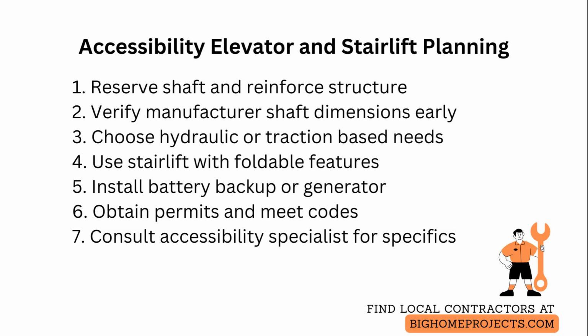Ensure all designs meet local accessibility codes and elevator safety standards and obtain permits early to avoid construction delays and demolitions. Work with an accessibility specialist who can translate medical or mobility needs into appropriate travel height, control placement, door width, and threshold tolerances to make the installation genuinely usable.